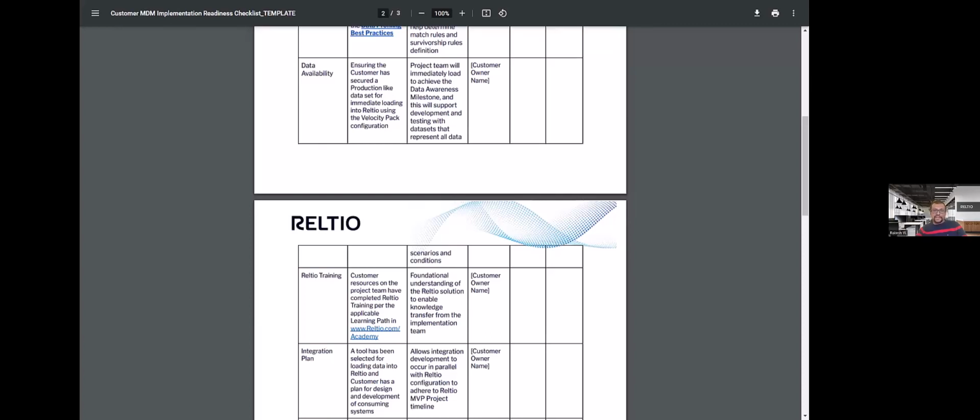The earlier we get it, the better, so that we know what sort of rules need to be built to get the data corrected. Also, one thing we recommend is to start working on the approvals much earlier in the life cycle. If you start working on the approvals after the implementation has started, then we might get delayed in getting the data in a secured way.